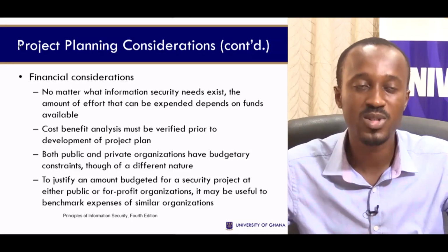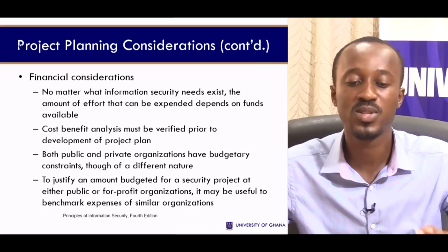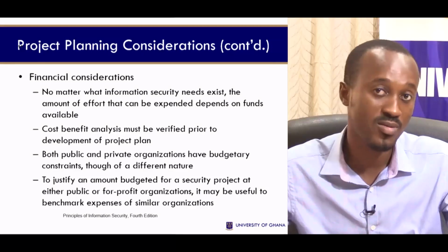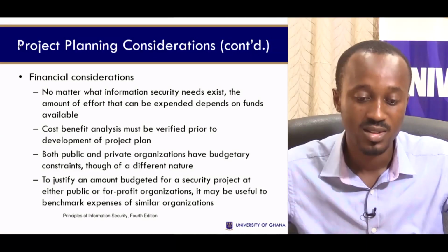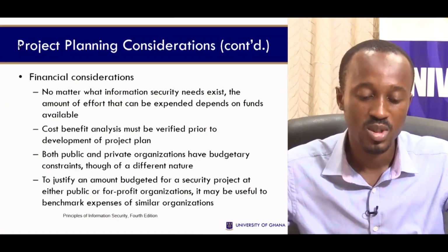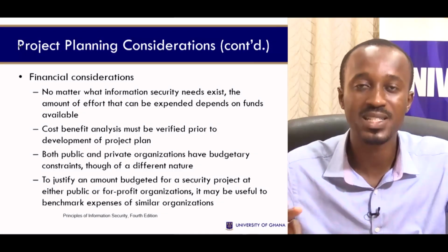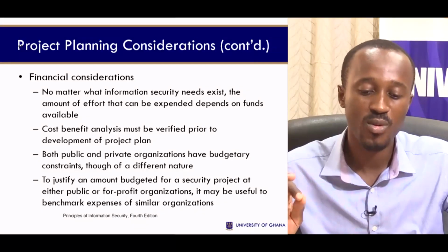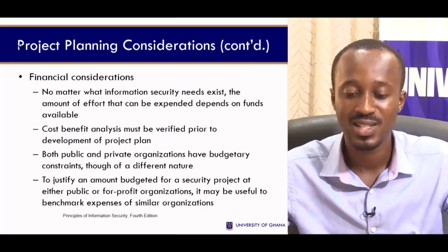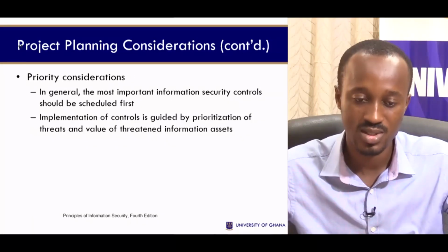Because of that, you need to do the cost-benefit analysis and verify that prior to development of the project plan, to make sure that the funds you need are going to be available to undertake the project. You must also be able to justify an amount budgeted for a security project at either public or for-profit organizations, and it may be useful to benchmark expenses in similar organizations.